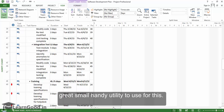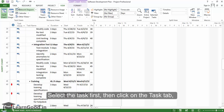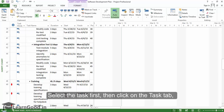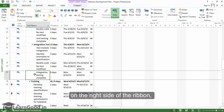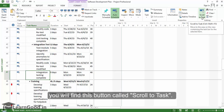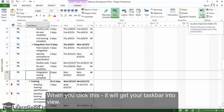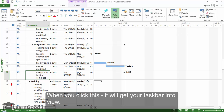There is a great small handy utility to use for this. Select the task first, then click on the task tab. On the right side of the ribbon, you will find a button called Scroll to Task. When you click this, it will get your taskbar into view.